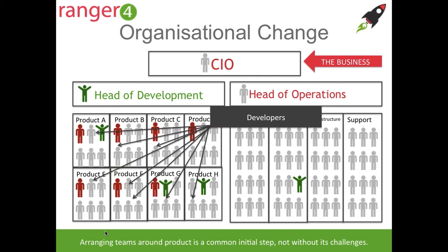And one of the other slight issues is that the red people here, who denote the product owners or the business people, quite often don't have a software background or an IT background, and they perhaps don't understand Agile development as well. We see them often pushing the development teams towards not delivering the iterations that they're going through their sprints to deliver, but actually bundling up larger releases, which doesn't help us do continuous delivery and is a bit of an anti-pattern in terms of what we're trying to achieve.